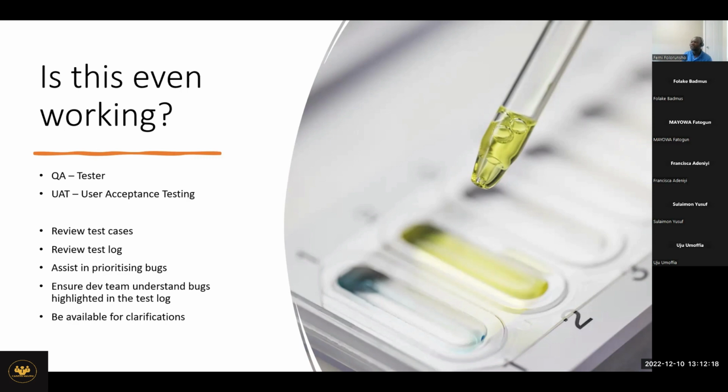He says, okay, the bugs were that in the email field on the contact form, if you put ABC, you can submit the form. If you put 1, 2, 3, 4, 5, you can submit the form. So the tester identified them as bugs: that the email field should only take email parameters, and the phone number should only take numbers, not symbols. Those are all the tests the tester was running. If I had reviewed the test cases, I would have asked why we are testing whether the email field takes only email. It's not a requirement. We have no business doing that. So I would have removed it at that point.